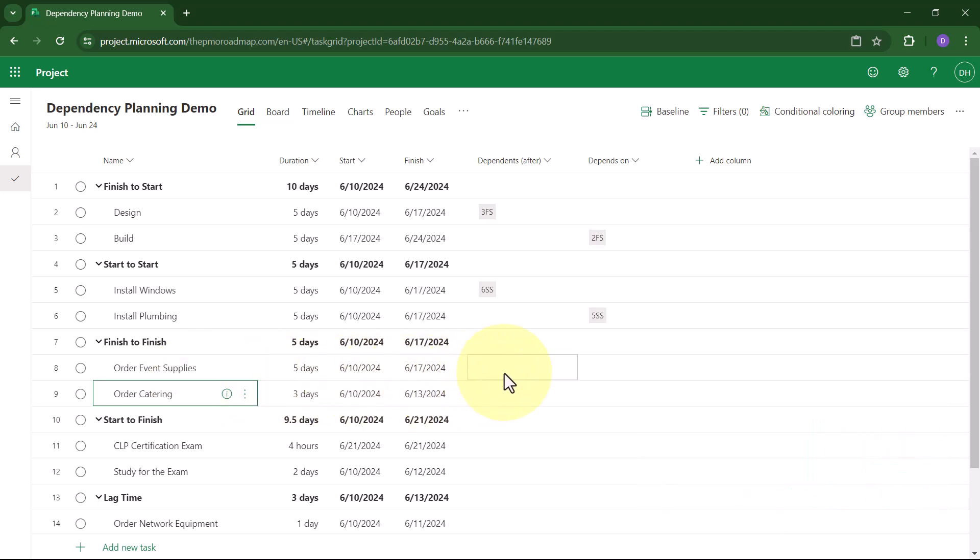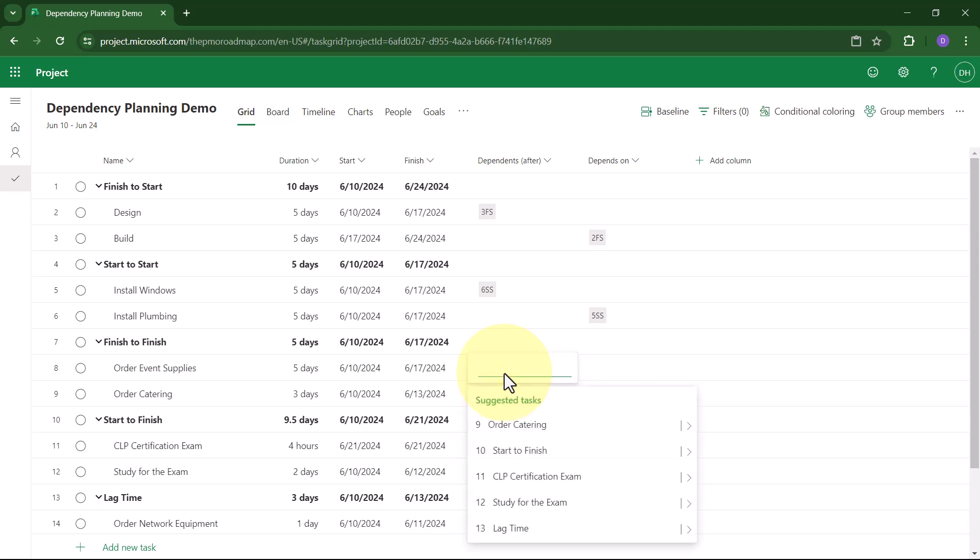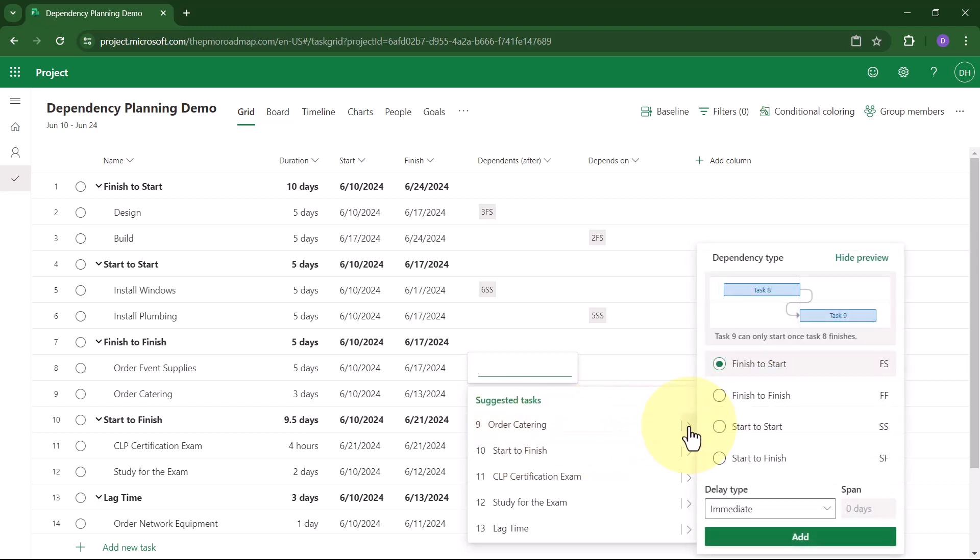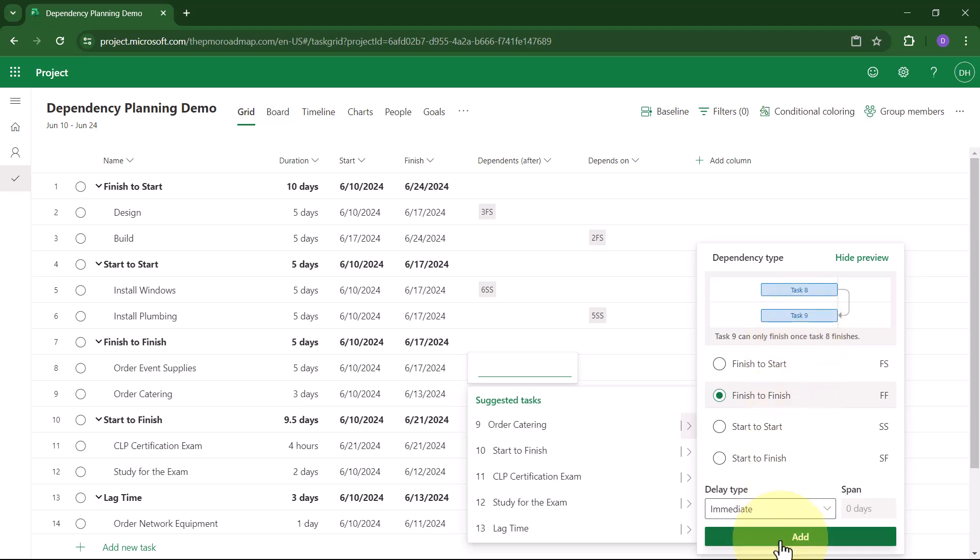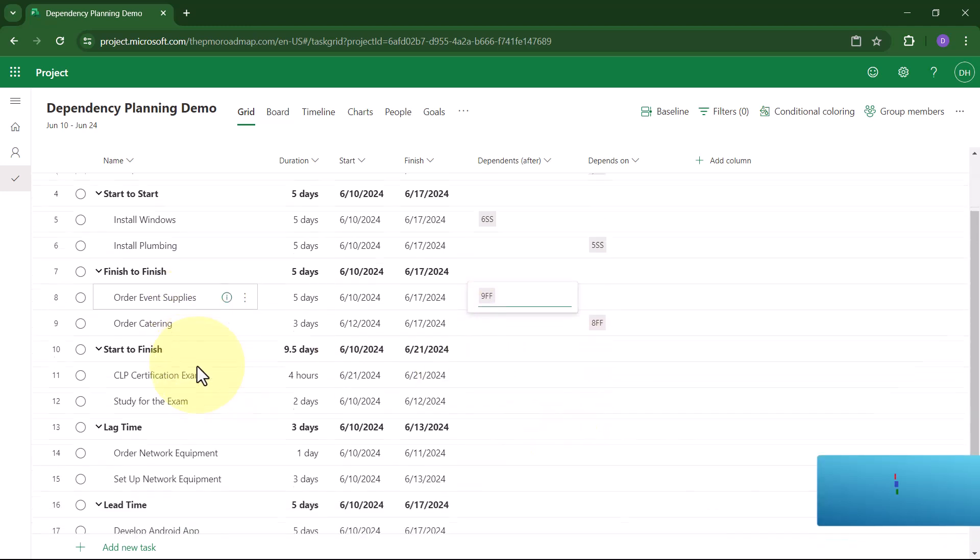Again, I'll click anywhere in the Dependents After field. On the menu, I'll choose Order Catering. I'll click the Flyout button, and here I can choose Finish-to-Finish. Notice the nice little preview of what this dependency will look like, and I'll click the Add button. And Microsoft creates the Finish-to-Finish dependency.